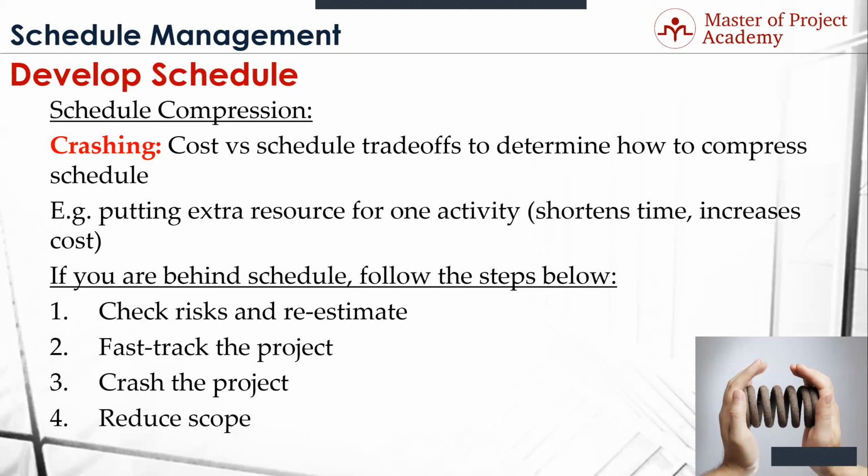There's your 4th option, reduce scope. I hate doing that because people do not like to hear that their particular part of the project was cut or moved on to another place. Or pushed into the next sprint. Yeah, and then the last one on there, just so I'm not leaving it out, is cut quality, which you can probably get away with, but it's risky.